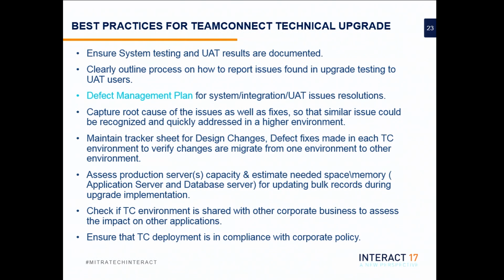All of the parameters that are specific to dev had to be externalized, and there were issues along the way with that. Also, the versions of the particular application server, even the tiny dot-whatever-2, matter, because when we were going through the upgrade, we knew that in general, the version of WebSphere we had in our corporation was certified.